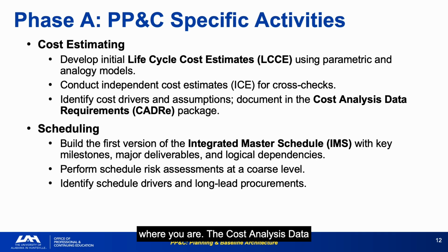The cost analysis data requirements, CADRE, package is the documentation trail that will be reviewed by cost credibility reviewers at PDR. Start it early and maintain it throughout both phases. The IMS built in Phase A doesn't need to be a 1,000-line network. It needs to capture the key milestones, major deliverables, and logic that shows the project team understands how the work will unfold.